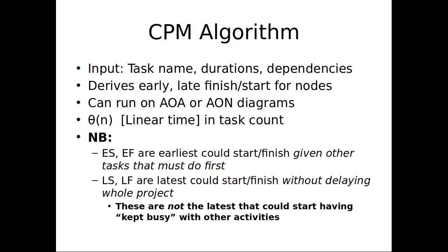Okay? I want to emphasize again. Early start, early finish, the earliest that we can start and finish given the other tasks that you have to do first. By contrast, late start and late finish are the latest you can start without delaying the whole darn project, the whole sequence of activities. This is not, and I want to emphasize, the latest you can start or finish while being kept busy with other activities. It's the latest you can start or finish without delaying the whole shebang, the whole sequence of tasks, the delivery of the entire thing. Okay.